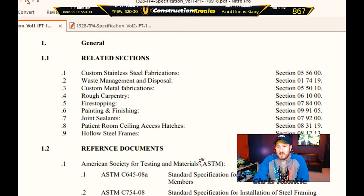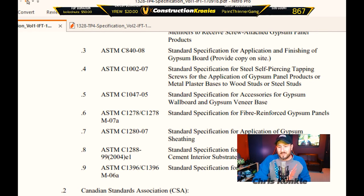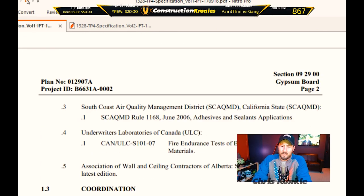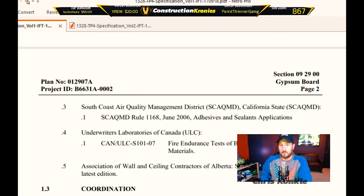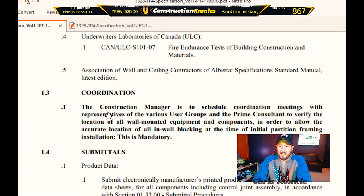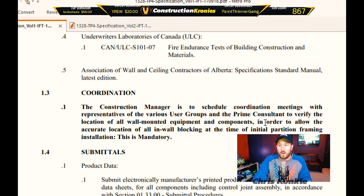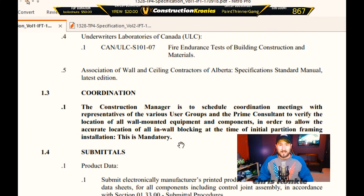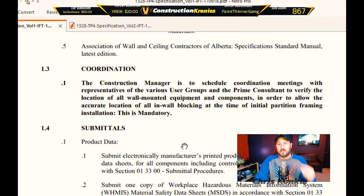This gives you a list of standards that your materials need to meet. You're going to go with major suppliers and they'll have the right products — you just need to know the right type of drywall, whether it's type X, type C, or whatever. Coordination is important: for example, the construction manager is to schedule coordination meetings with representatives of various user groups and the prime consultant to verify the location of all wall-mounted equipment and components in order to allow accurate location of in-wall blocking. That takes time — you need to know that when you're pricing the job and as a foreman so you don't close up walls prematurely.